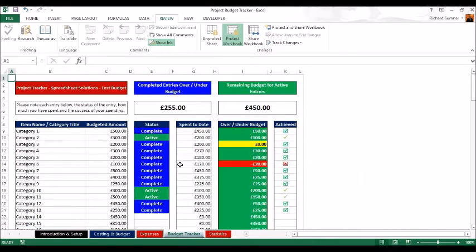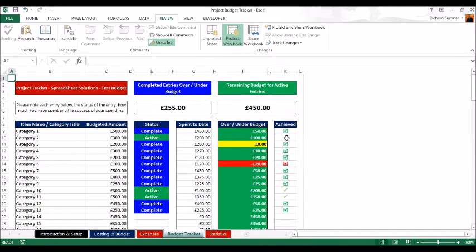The budget tracker is very similar — it shows how much over budget each item is, by status (complete and active), and also shows each one individually. For instance, category 3 shows we spent 200 pounds and had 200 pounds budgeted, so we've broken even — a tick indicates we've achieved the target. A tick without a block means still active but on target. A red cross means we've missed the target: for example, budgeted 100 pounds but spent 120. An active item that's over budget would show a red cross with an orange background.